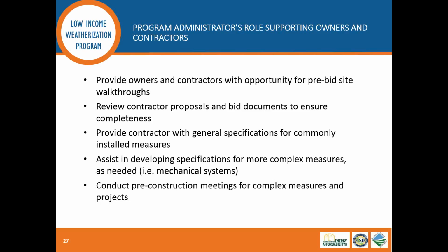We'll provide you, the contractors, with the general specifications for commonly installed measures, as well as specialized specifications and performance requirements for more complex measures, again, so that you know what the expectations are from day one. We'll conduct pre-construction meetings for those complex measures, and then we'll be coming out on site during construction, typically around 50%, but it really could come out at any stage in construction to make sure that we're all on track and on the same page.